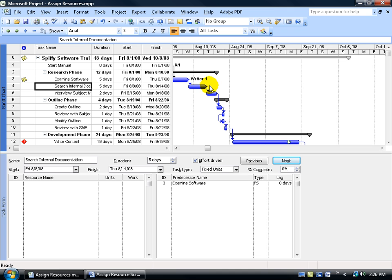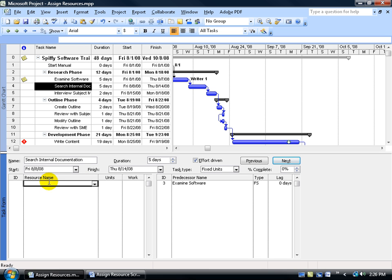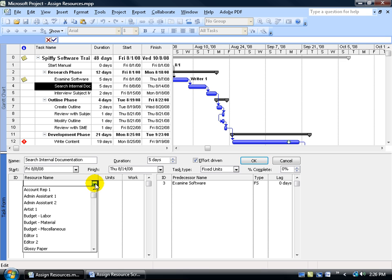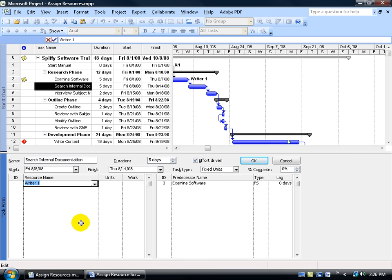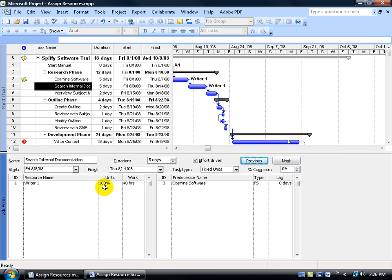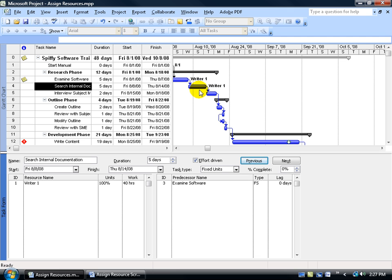Like I said, the second way of assigning a resource to a task is down in the Detail pane here. Go ahead and select or click in the blank empty cell below Resource Name. Click on the drop-down arrow. You've got a list of all your resources. I'll select Writer 1. And when I'm finished, I can go ahead and click OK. And automatically it defaults to 100% units, 8 hours a day for 40 hours because the duration of the task from August 8th to August 14th is 5 days, 5 working days. And, of course, you can see that Writer 1 is up here in the Gantt chart assigned to Task 2, next to its bar.